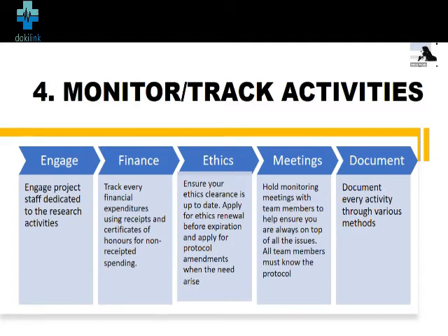You must track every financial spending. Every expense, any money spent must be receipted for. If it's an indirect cost and you do not have a receipt, then the certificate of honorarium must be made available. Ethics clearance is usually not a one-time for all thing, particularly if the study or the research is going to span the period of the approval.